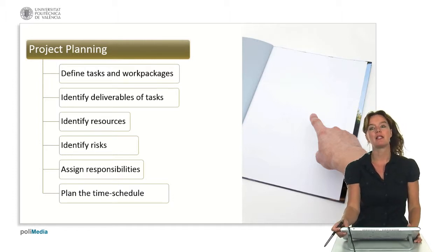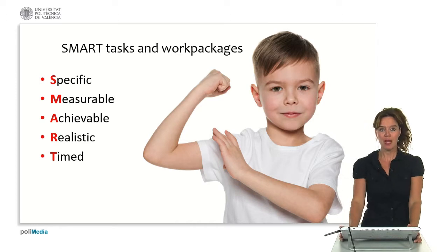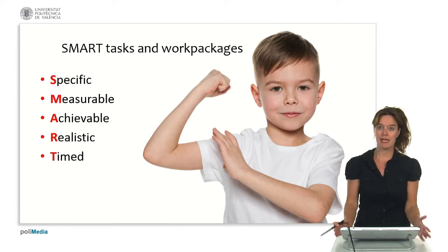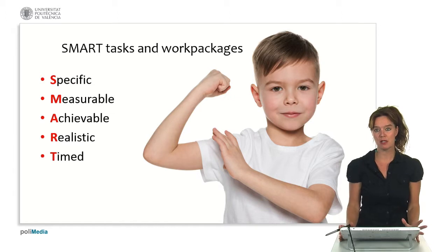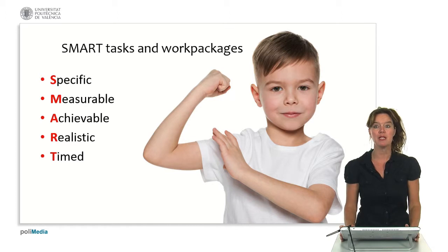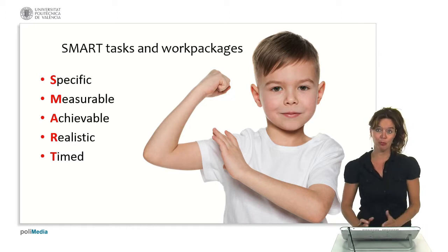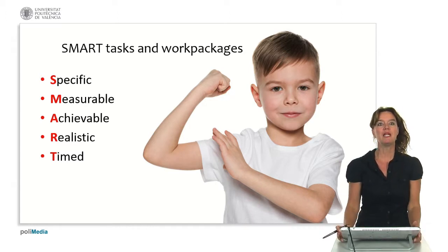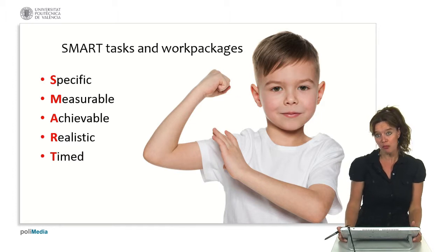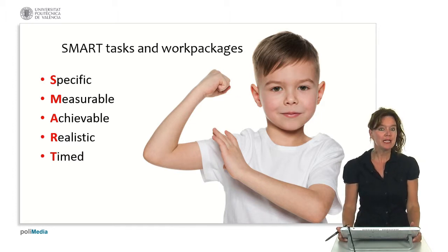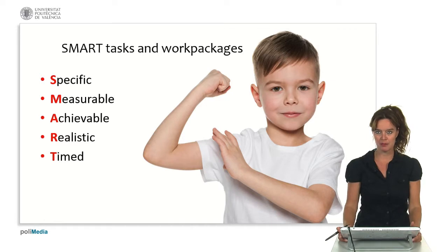So one thing that project managers use as a help to know how to structure tasks and work packages is to do it SMART, meaning be specific about the tasks, make sure that the tasks are measurable so you can monitor the progress of these tasks, make sure that the tasks are achievable, make sure that they're realistic, and make sure you time them. So we can also see whether we're going well related to the time aspects of the tasks.